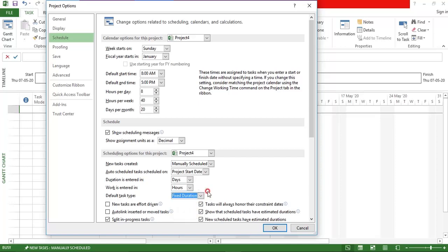With fixed units, if I say 10 laborers are working, and those laborers are allocated to a particular task, and if the activity becomes critical and you try to resolve the resources, that is if there is an over allocation, if there are 5 laborers but the work time is getting more, it will show as over allocated labor.